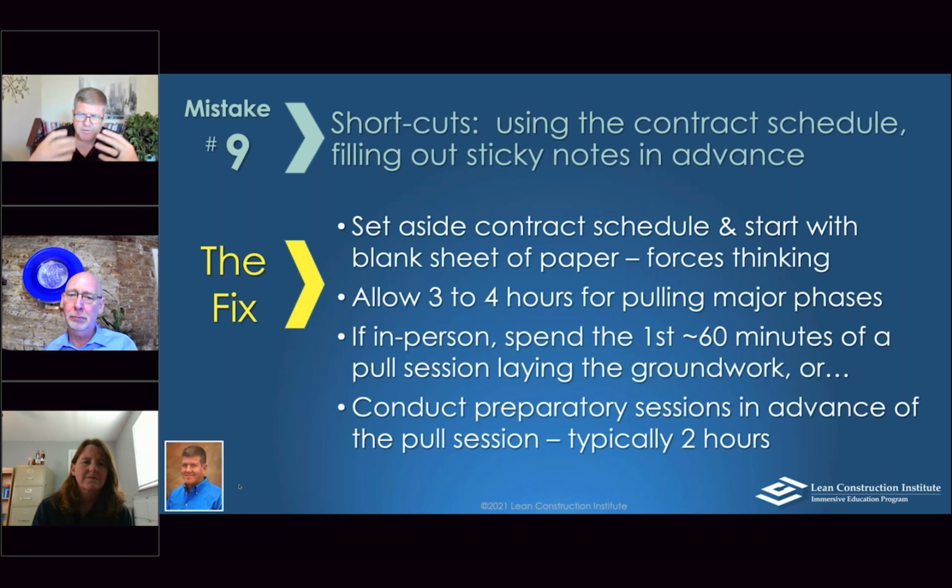So my general thought is to set aside that contract schedule and start with that blank piece of paper. We know what the contract says. Let's just set it aside, or let's just look at it in the beginning and say, okay, we need to be dried in by Thanksgiving. Okay, and then just set it down.